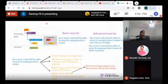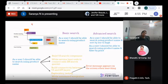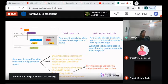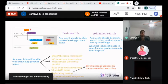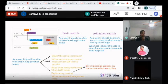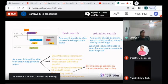Now let's look at a practical Agile example. In Scrum — which is a widely used Agile software development methodology — there'll be a theme or an epic. If the product owner says 'my customer wants a search capability,' that becomes our epic. You can't just code 'search' without breaking it down, so we start breaking that epic into workable units.